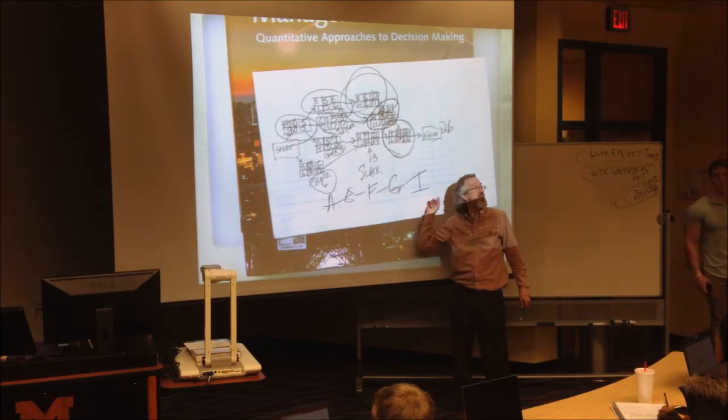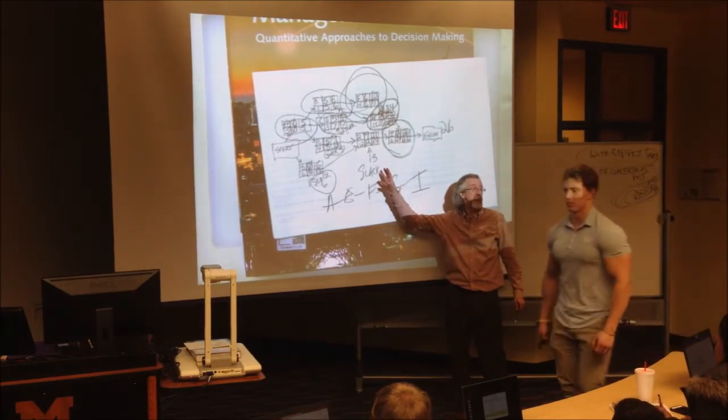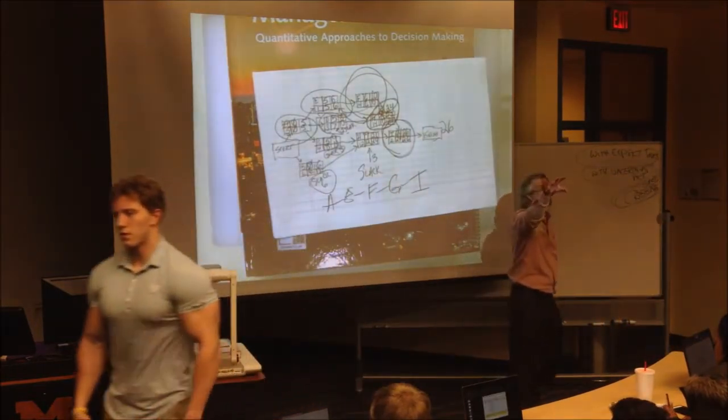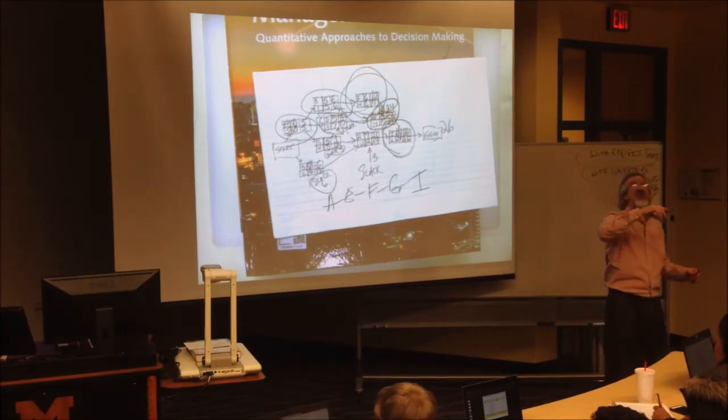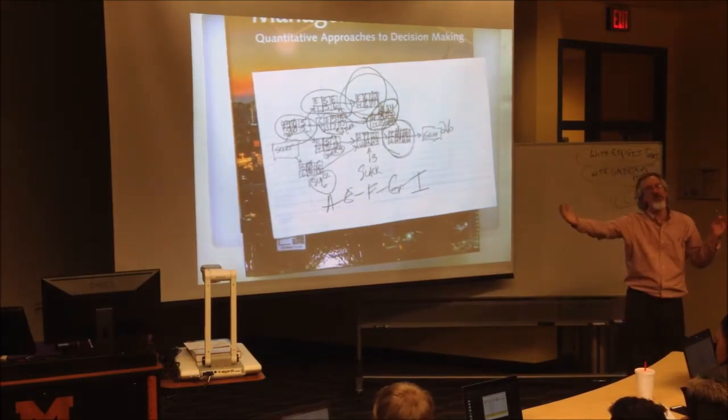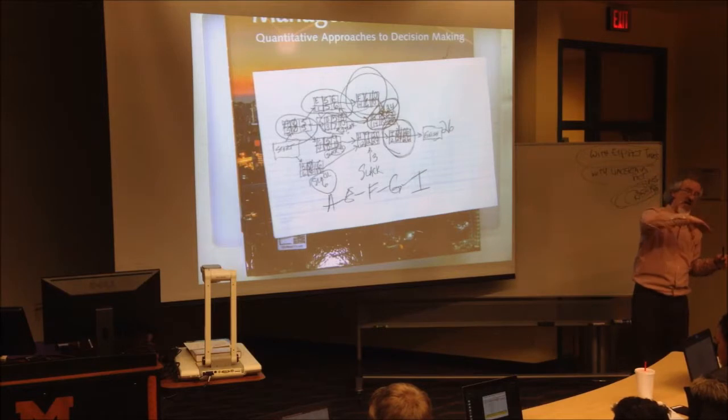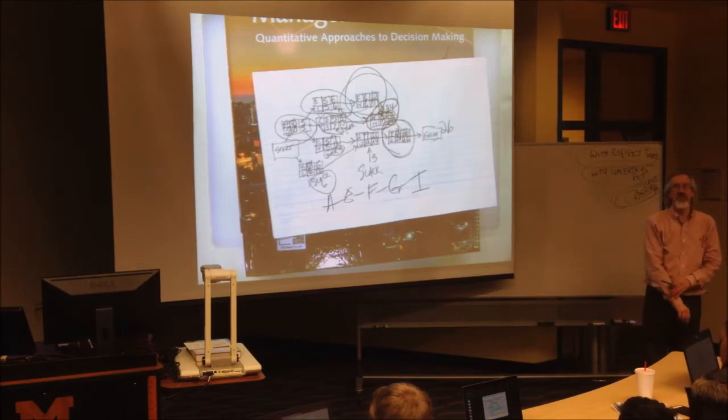As we start heading to activities with uncertain activity times, that critical path you identify is what determines the project variance. You've got to be able to calculate the project variance so you can calculate the Z to get the probability of it being done at a certain time, more or less. Whatever you're being asked. Everybody hear that?